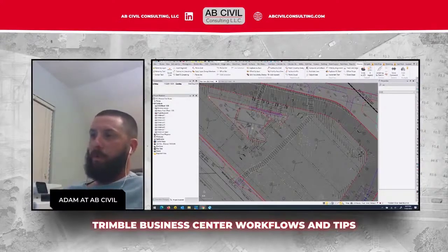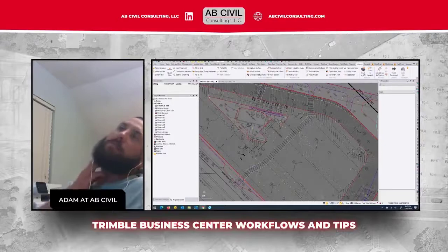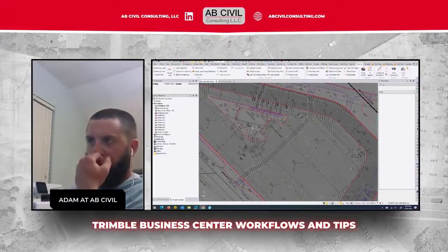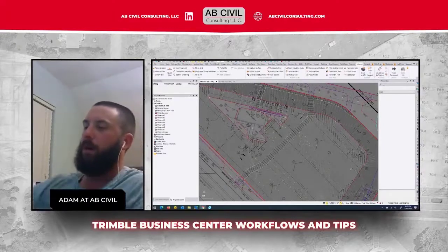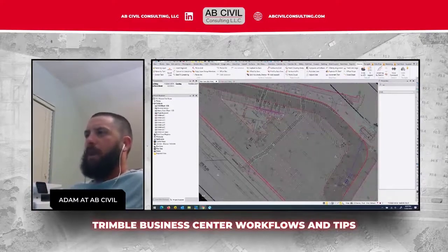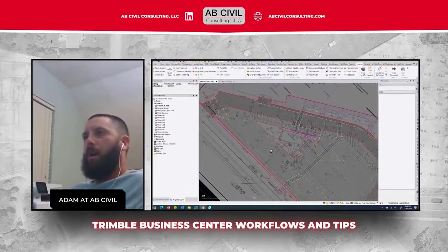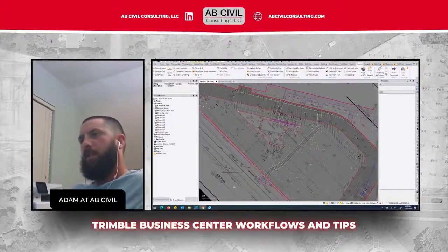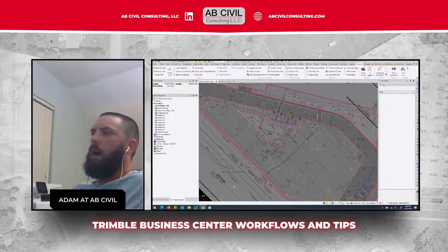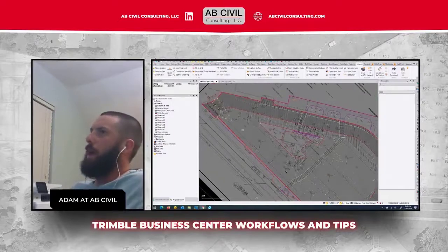You fire up the rover and you just take a topo of the undercut. In this case, you just need to topo the bottom of it because the payment is only to the subgrade. Yeah, so I like to keep a sampling distance of 5 feet. It probably doesn't make a huge difference on a job like this, but it's actually something that I want to learn. Do I mess with triangulation lines? No, not normally.